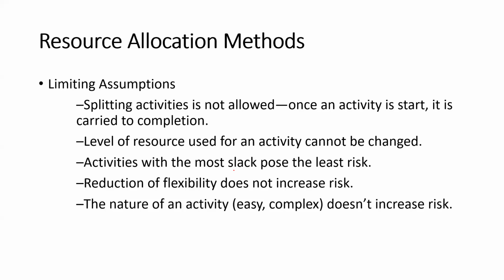When we can delay activity C by 10 days, there is a lesser risk compared to A, which only has 2 slack.